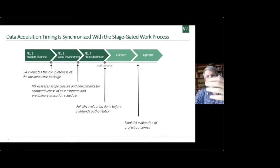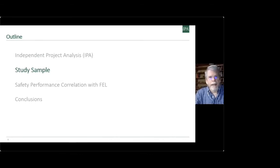Then we also interview the project and collect the actual results of the project after mechanical completion. And we use those to be able to make a look back and say how well did the project perform relative to its targets, as well as how well it performed relative to objective external benchmarks of similar projects in the industry that have been completed. So this is our data collection process at various stages in the life cycle. Most importantly, at authorization and then again, at closeout. So that's IPA. So the relationship that we have seen over the years is a relationship between that front end work, how well that work is done in the front end and the ultimate results of a project, how successful they are. And in particular to this workshop and community is how that front end work is related to and drives construction safety performance.